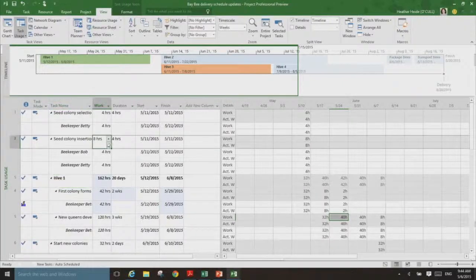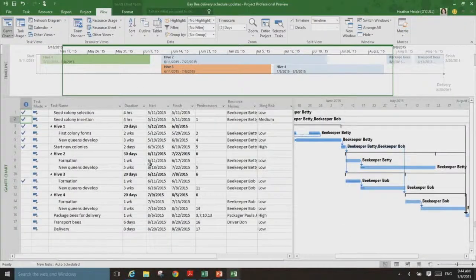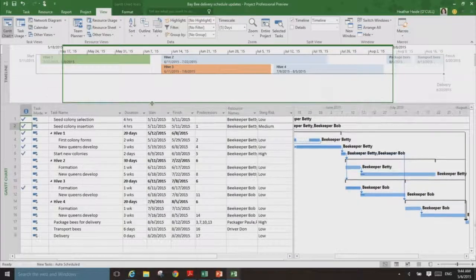So one thing Eli talked about is the timeline view. We know people, especially project managers, tend to love the Gantt chart, but the Gantt chart gets very, very detailed. And typically it has too much information for you to send it out to a team of people, unless they're directly working on it. So if you're working with customers or management, et cetera, they probably don't want the Gantt chart. They just want the high level: what's happening when, are you on track? And the timeline view is a really good view to help show that, because you can select whatever task you want and use that to highlight them.